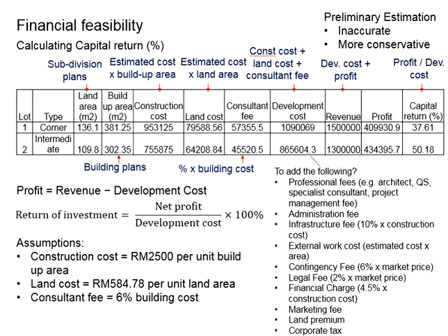It would be easier if you have historical data that you acquired from the previous project. Observe the expenses from the previous project, the quantum of expenses, let's say for the external work costs, for the infrastructure costs, the marketing fees, legal fees, and etc. You're going to expect your project going to have more or less similar quantums in terms of the cost, not too far deviated from your past experience.